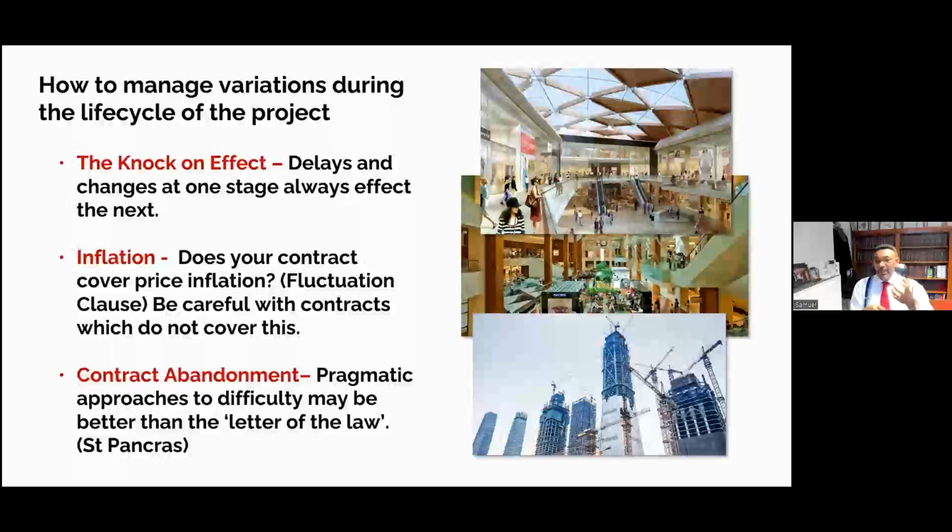By that, I mean at the relevant time that it is happening. So if you have identified a variation, publicize it. Now, if you're the one going to execute the variation, a lot of contractors fail to pick up their variations until they get to final accounting. That is the worst possible time, because if you leave it to final accounting, you're most unlikely to recover.